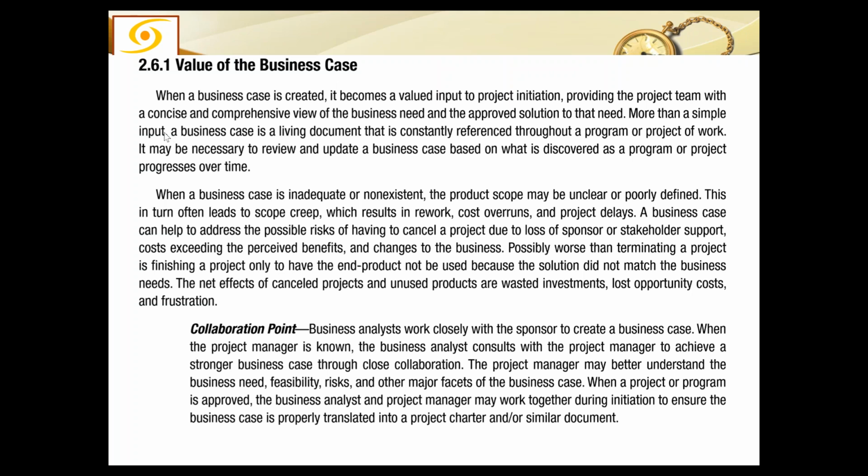Project team with a concise and comprehensive view of the business need and approved solution to that need. More than a simple input, business case is a living document that is constantly referenced throughout a program or project. It may be necessary to review and update a business case based on what is discovered as a program or project progresses over time. तो बिजनेस केस लिविंग डॉक्यूमेंट है, साथ साथ उसको रिवाइज आप करते रहेंगे।